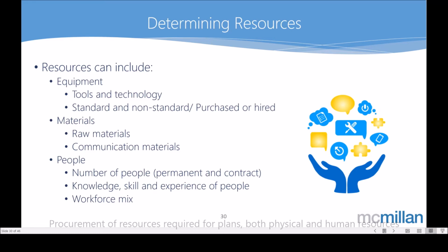And that's really important to think about when you're developing your plans, because usually if your plan requires a couple of thousand sheets of paper, you don't need to think too much about including time for it to get in or for an ordering process. You can pretty much just assume that that stuff would be available. You might have an extra step in there of putting in a requisition for an additional 2 reams of paper.